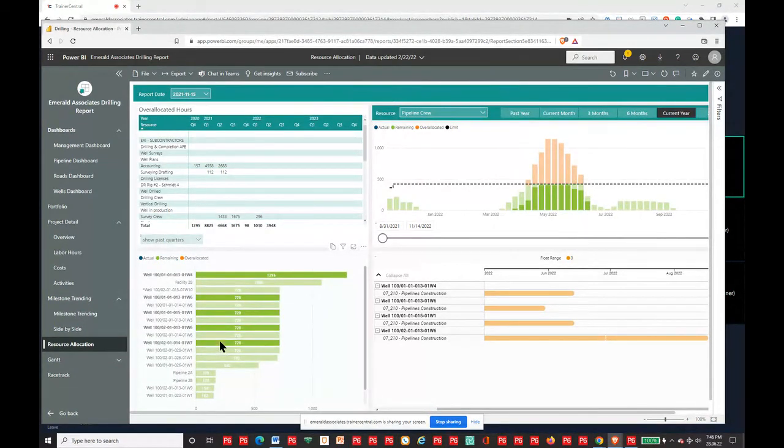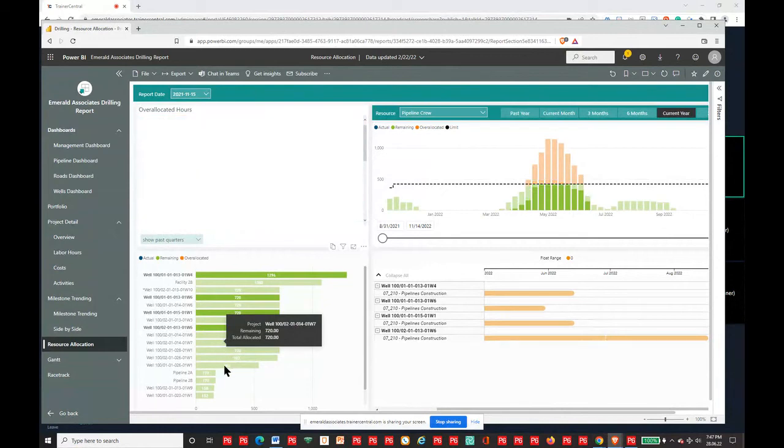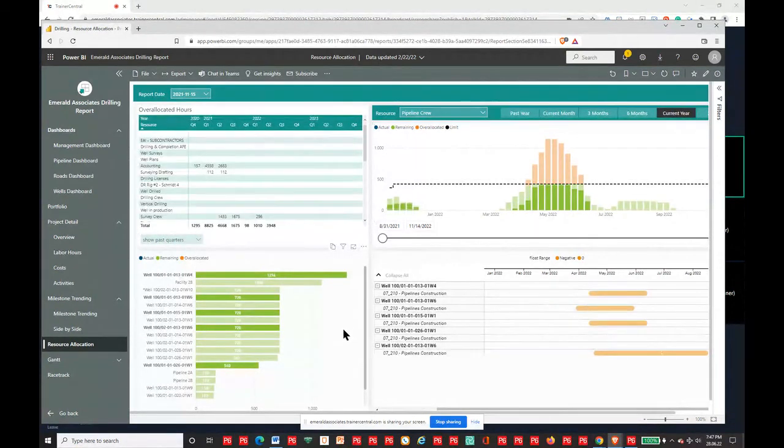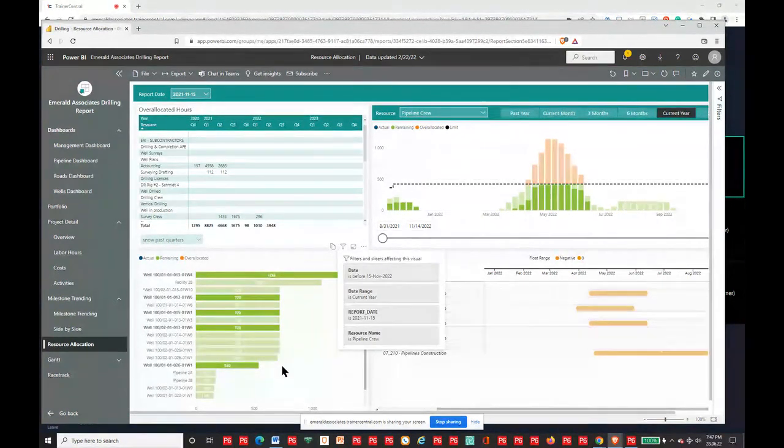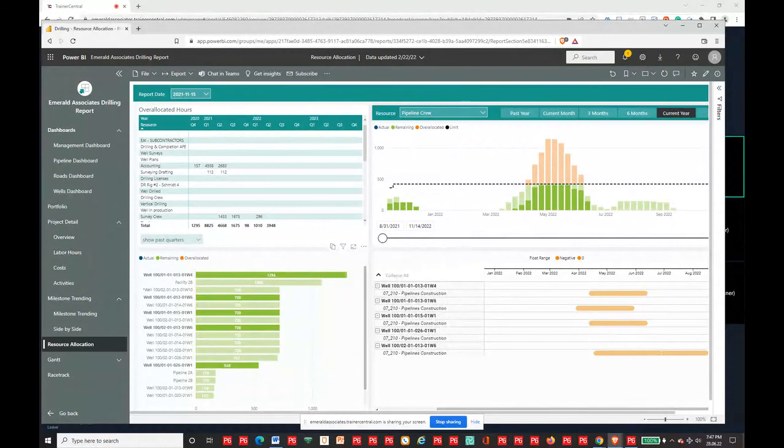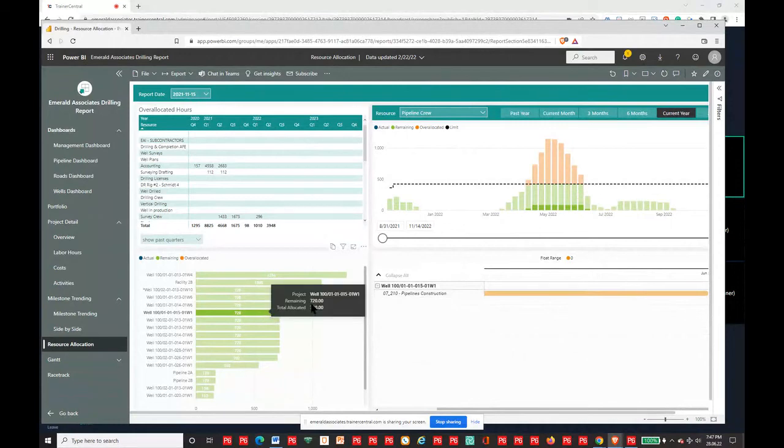You can go down and you can select it. And this last one just put me into an overload situation. So maybe the last one isn't what I want. I want to go down and select one more. Their resources are over here. Not that you would necessarily finalize it from there, but this is very handy to see what activities are actually generating parts of your profile here.